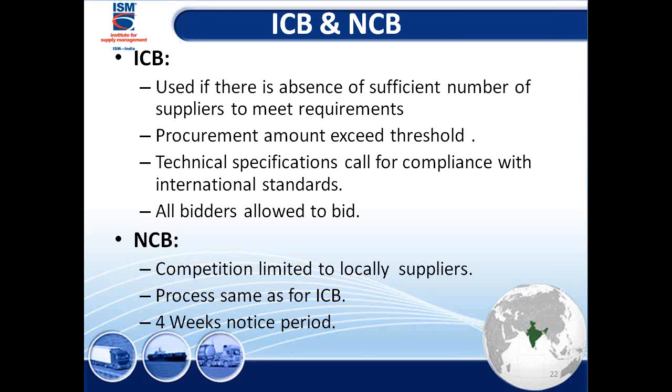The notice period, I think this question comes very often. Are we giving a fair chance to the people? For NCB, 4 weeks is good enough. For ICB, you need a little bit more, 5 to 6 weeks. This is how I will look at it.